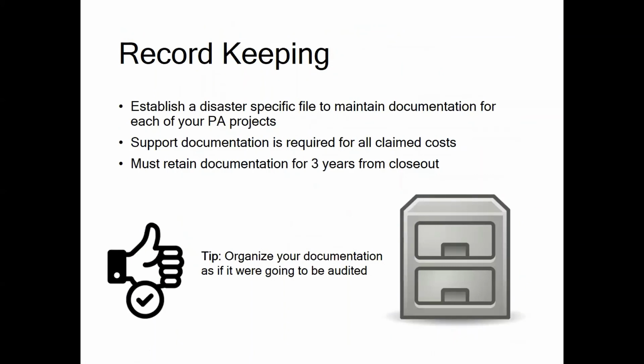Documentation must be retained for at least 3 years from closeout. We recommend organizing your documentation as if you were going to be audited. You'll want to establish a disaster-specific file to maintain documentation for each of your PA projects and include all support documentation for claimed costs.